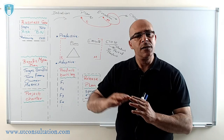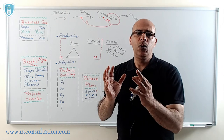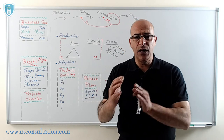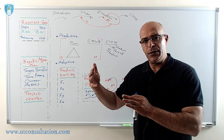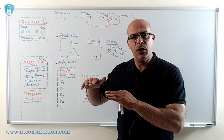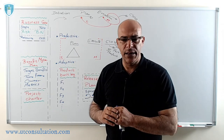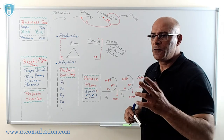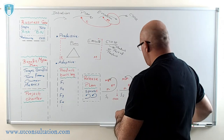Plan for the whole scope — make a complete plan, then do time estimate, cost estimate accordingly. We create baselines: scope baseline, cost baseline, time baseline. These three together are developed during the planning stage and are detailed and agreed upon. Execution starts accordingly, and this is called plan-driven. Any variance during execution is measured against these baselines, and we always try to keep project performance aligned according to the baselines predefined during planning.